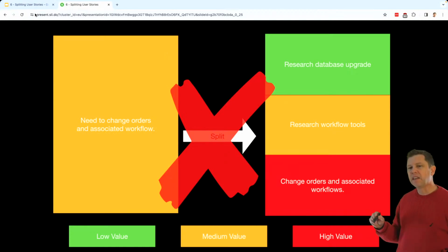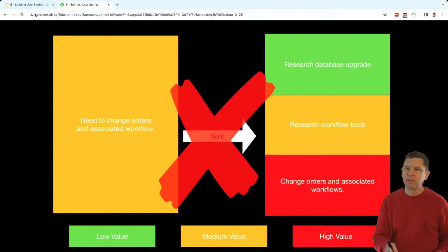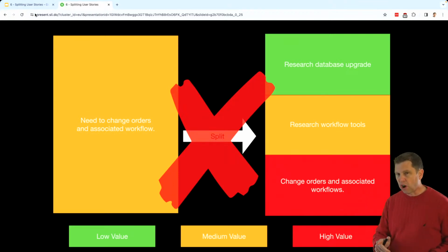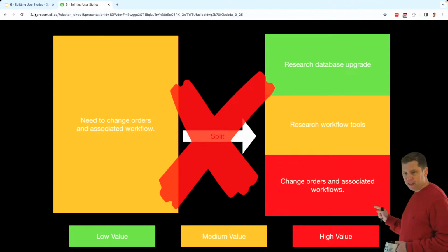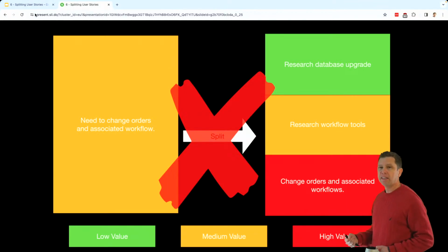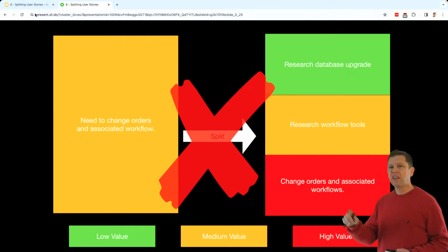And what happens is you end up in this research phase, without it being constrained by here's exactly what the customer is asking for, and our goal is to deliver this. So if I need to research something, it's just what's necessary to deliver this story. The scope of those research stories tends to grow and grow and grow because people keep thinking, oh, well, we should check into this and we should check into this. You're far better off, on average, if you're doing this story after story, to go ahead and get the simplest thing that would work through for the customer and then get customer feedback, even if they come back and say, now we need it to do something very, very different. You build exactly what we asked for. We've tried it and we need these things changed.